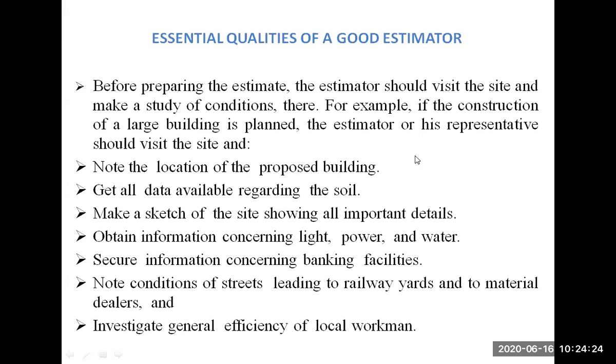Then investigate the general efficiency of local workmen. Whatever local workmanship you are going to get while working on the site, you should have the knowledge about that local workman and the efficiency of that particular workman. Whether I have good skilled workmanship, these are my unskilled workers, these many are my skilled workers, this is my particular contractor. So whatever manpower you are going to take along with you while completing a site, and for being recognized as a good estimator, you should know the efficiency of local workmanship. That is, what is their power, what is their strength of actually working on the site. So these are some essential qualities required for being recognized as a good estimator.